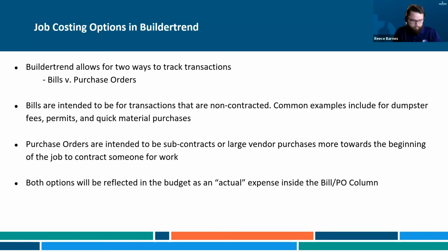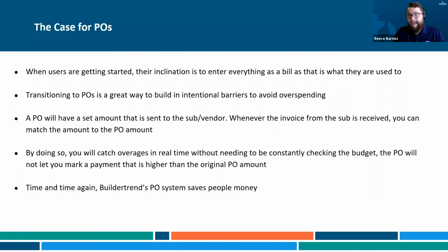Another thing that I see being valuable here, as far as using a PO with the subcontractor, is running out installments in waves according to phases of the project. Now that also starts to give you an understanding. It starts to paint a picture of, why are we getting paid here? Do we need more cash flow? Do we need to clean up this side of our subcontractor relationship? Are we paying people too early and then they're not getting it done?